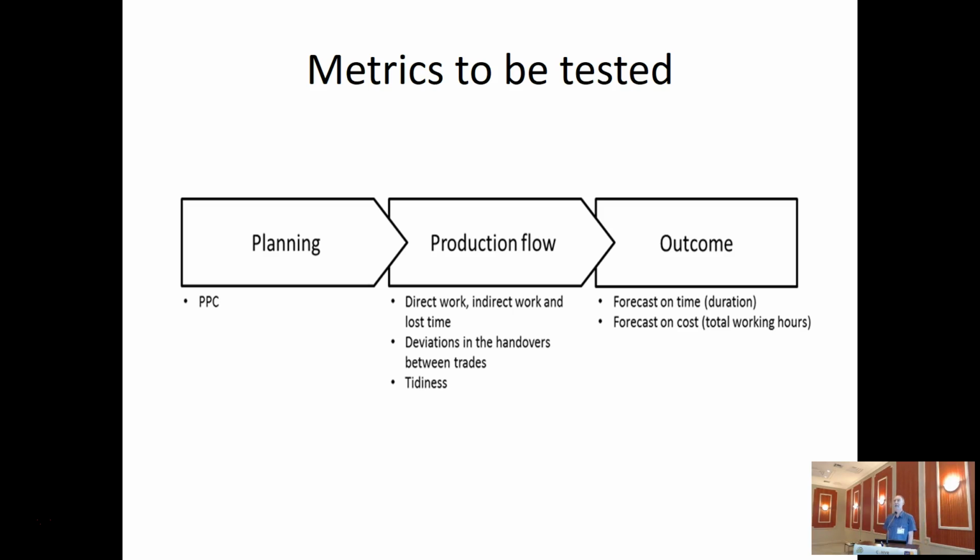I'm of the group that says the goal is to have increasing trends of PPC, and if there's a drop in the PPC, you can correlate that with the general contractor saying to the trade partners, okay, we've been doing very well, let's challenge ourselves. And if there's a drop, okay, but let's continue going and continue to increase the PPC. I just wanted to express that concern.